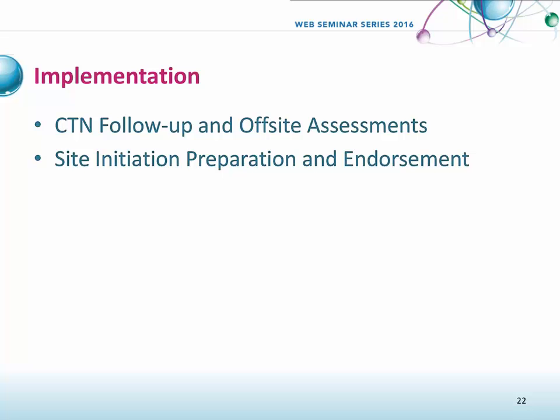So it really is very detailed, and it's designed in a way that when the site fills this out and when it's close to completion, that's when we know to send our monitors in and to really have that site initiation visit. So that is a very useful document and one that we use in every site, in pretty much every study in the CTN, or a good majority of them. We also put some more information, for example, the endorsement checklist. And let me show you an example of both of these, one page from both of these documents.